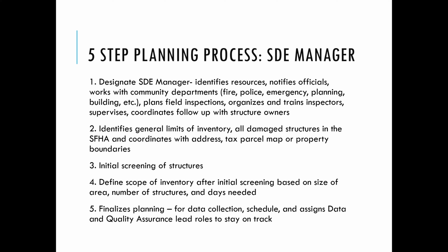So define the scope and then determine how long you think it's going to take to complete the assessments. Because once you've done the data collection, then we have to process all of that and get those determinations out. And so finally, you're putting together this plan, like who's going where for data collection, what the teams are, the schedule, and then hopefully you have someone to assist you with data and quality assurance to stay on track with that and to double check work because we want quality and consistency in that data.